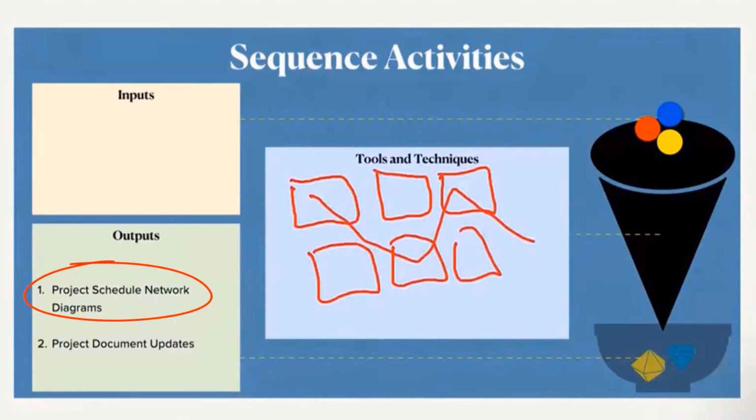So the longest path is important because that is the worst case that could happen for the project, right? So always the critical path is chosen. So this kind of diagram is called the network diagram. So this sequencing will help us in creating it.